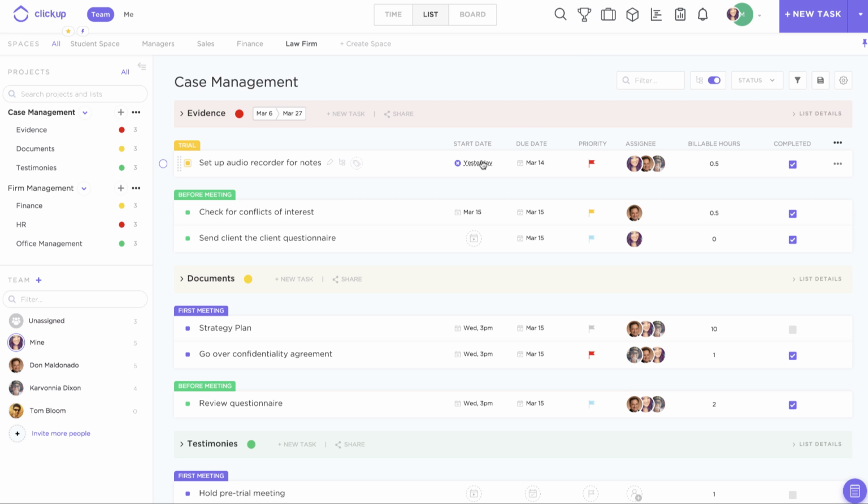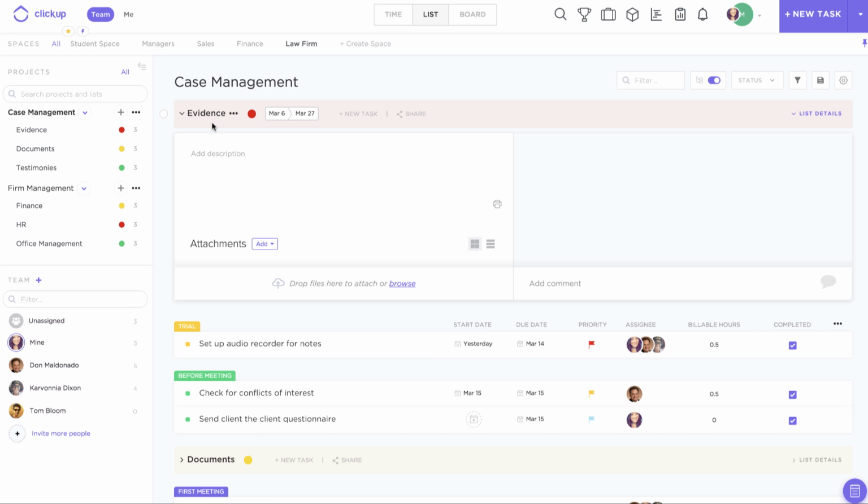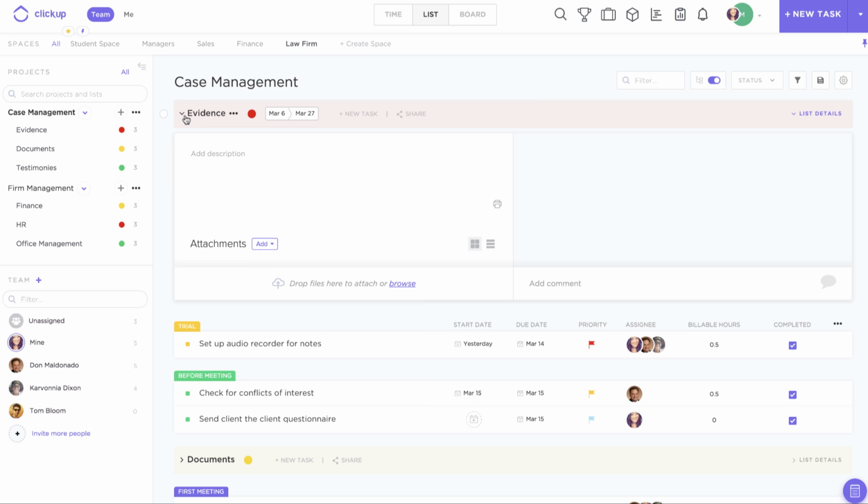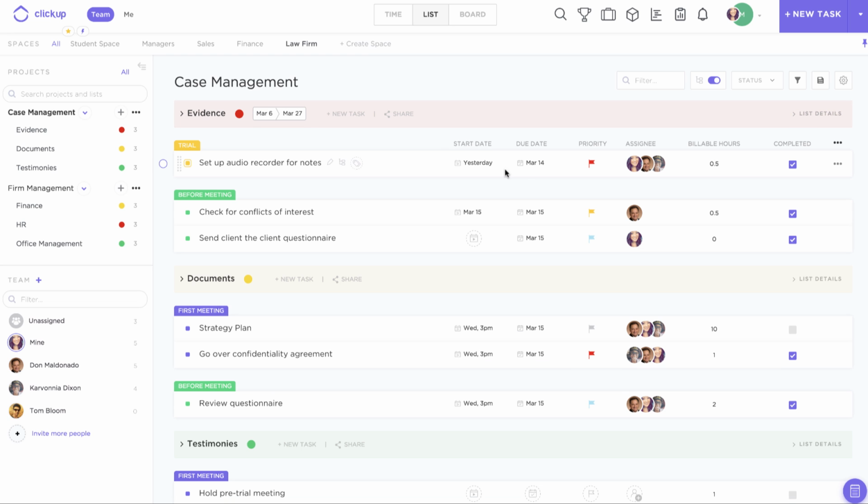We've talked about setting up start and due dates for your tasks, but keep in mind that you can also set a start and a due date for an entire list. So for example, for my evidence list here, I've actually opened up the list details section by clicking on this banner here. And I can click here to apply a start and a due date for this entire list. So it sets up a milestone and helps me better place all of my task dates within those overall dates I've set for the list that the tasks are in.